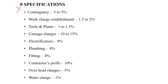The complete estimate includes standard additions: Contingency is 3 to 5%, Work Charge Establishment is 1.5 to 2%, Tools and Plants is 1 to 1.5%, Drainage charges is 10 to 15%, Electrification is 8%, Plumbing charges are 8%, Fittings is 4%, Contractor's profit is 10%, Overhead charges is 5%, and Water charges is 1%.